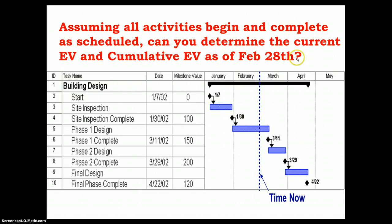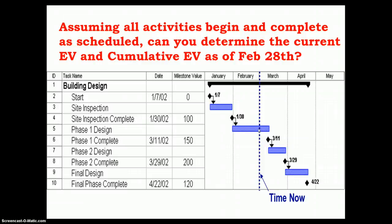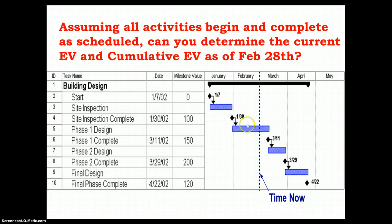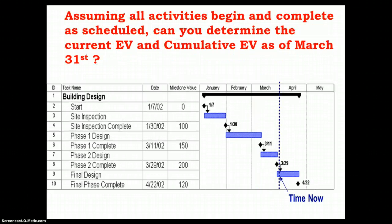For the second period, can you determine the current and cumulative earned value as of February 28th? No additional milestones have been achieved. Some work has been done on phase 1 design, but phase 1 is not yet completed. Credit can only be taken once a milestone has been accomplished. Since no milestones were scheduled or accomplished during February, the earned value for this period is zero, and the cumulative earned value by end of February remains $100,000.